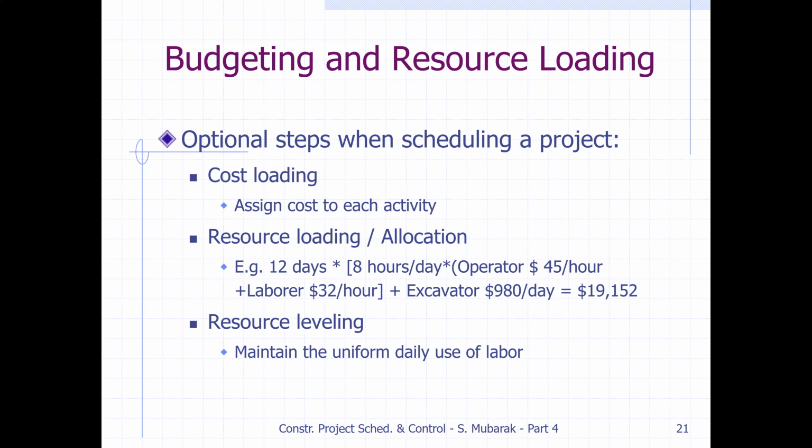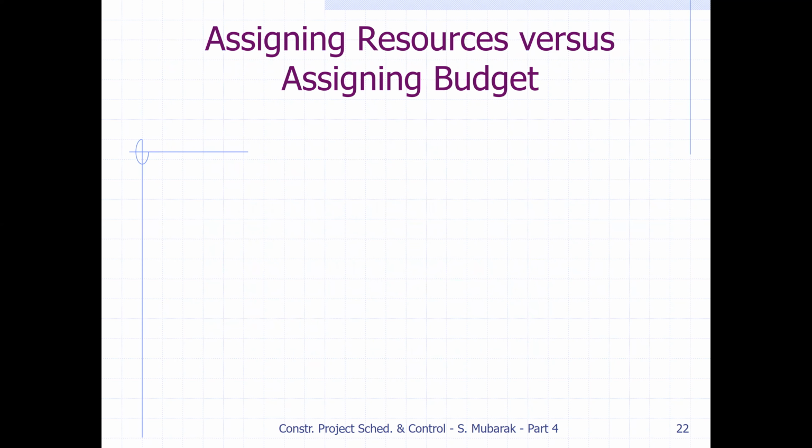This is what a good project manager does. They always do resource leveling, and they don't kick off the labor force today and have a different number of people each day. We don't kick out people and then re-employ them again. We try to maintain resource leveling so the people working with us stay for as long as we need them for the project.